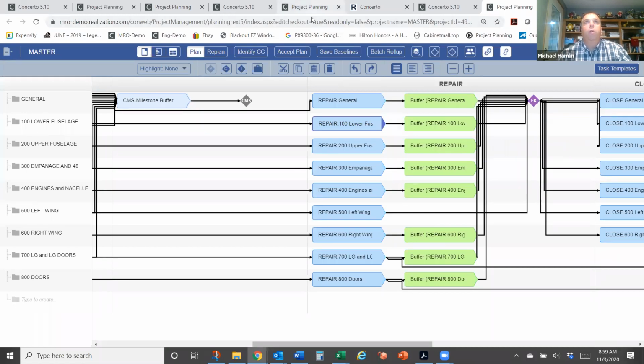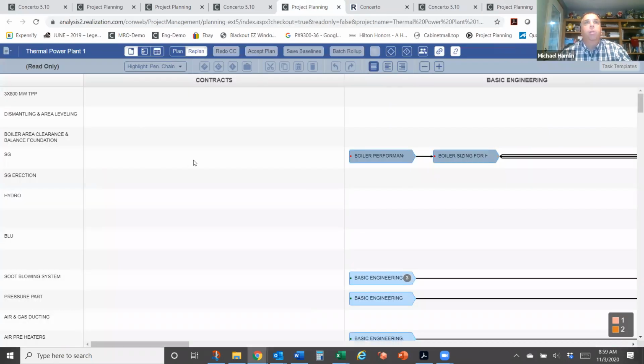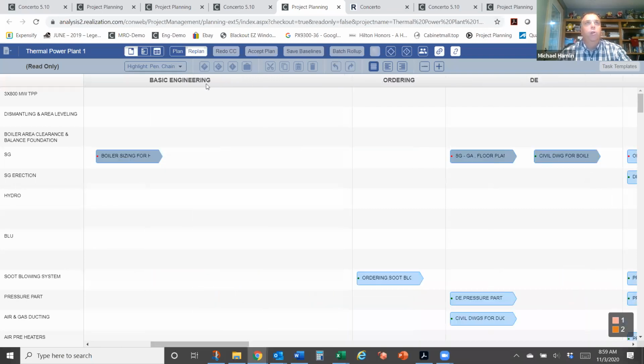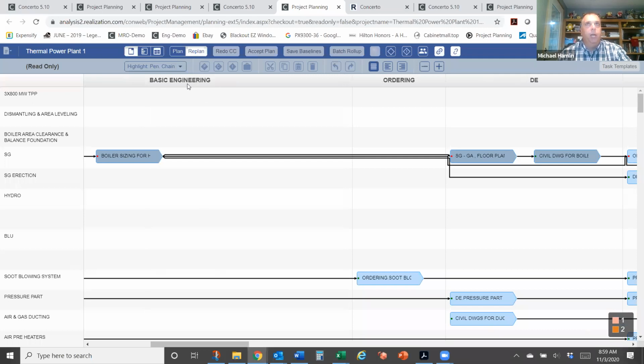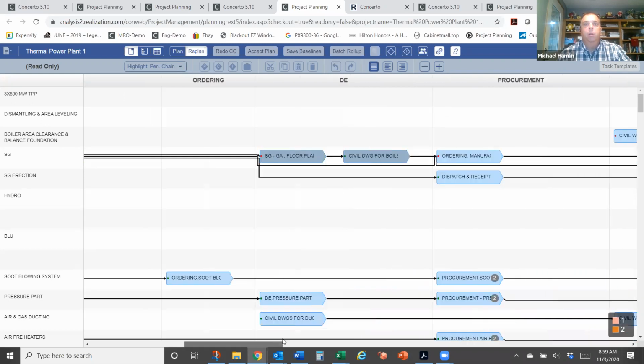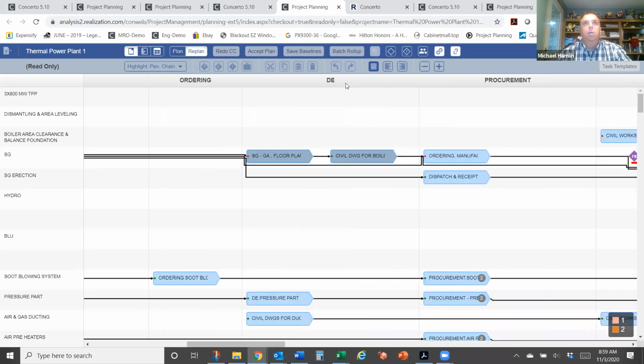So bear with me going over here just a minute. I'll go through a construction project plan really quickly. But the idea is really still kind of the same, that I have some phases across the top. Now you'll see I started all the way back with contracts on this. Then we're doing some engineering or architectural work, ordering materials, some more design work.